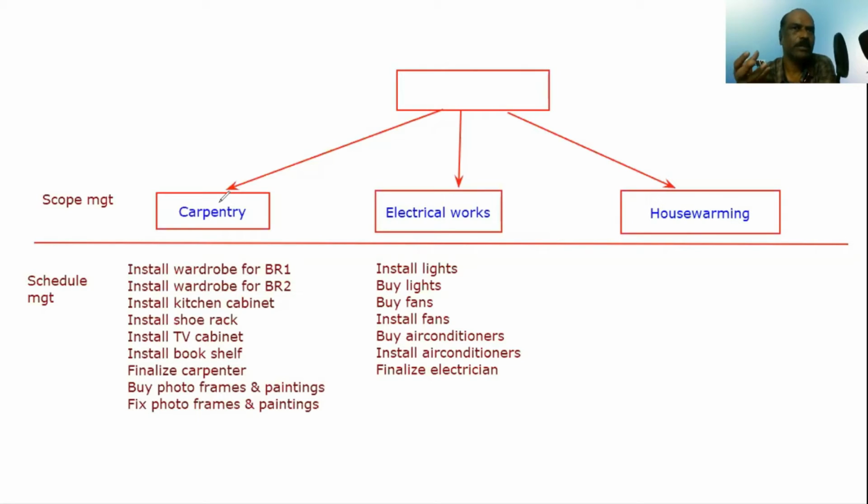So maybe you want to monitor, like startup design could be a milestone. Completion of foundation could be a milestone. Completion of first floor roof could be a milestone. Completion of the civil work could be a milestone. Completion of, let's say, landscaping could be a milestone. So a milestone could be anything where you want to define some targets so that you can monitor the project.